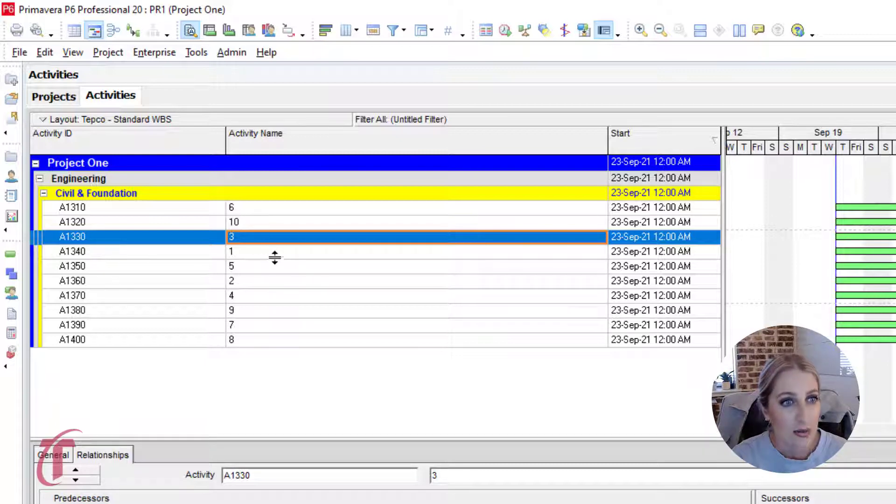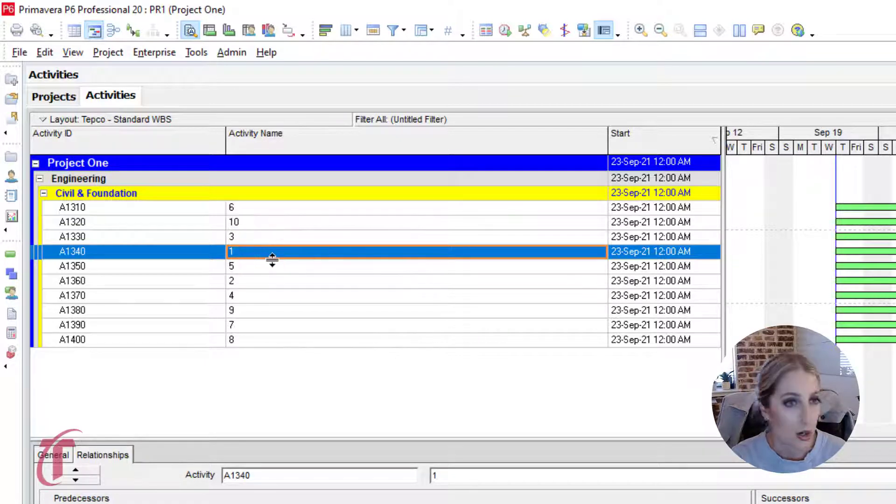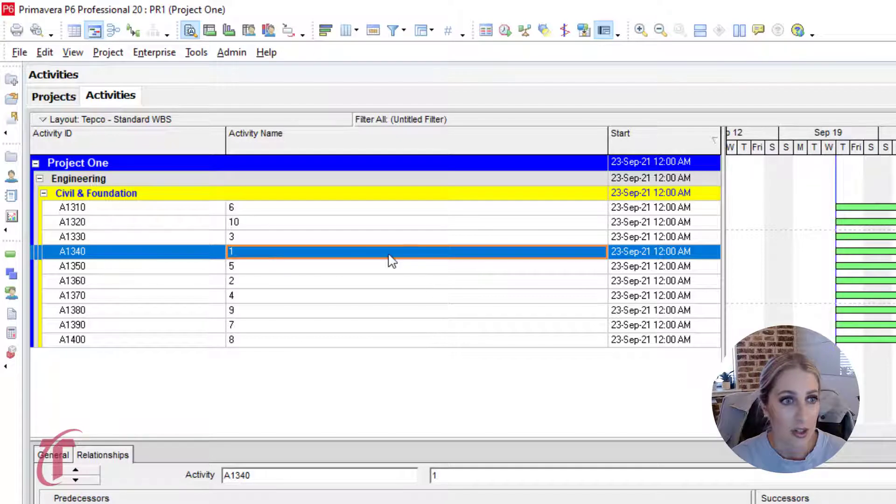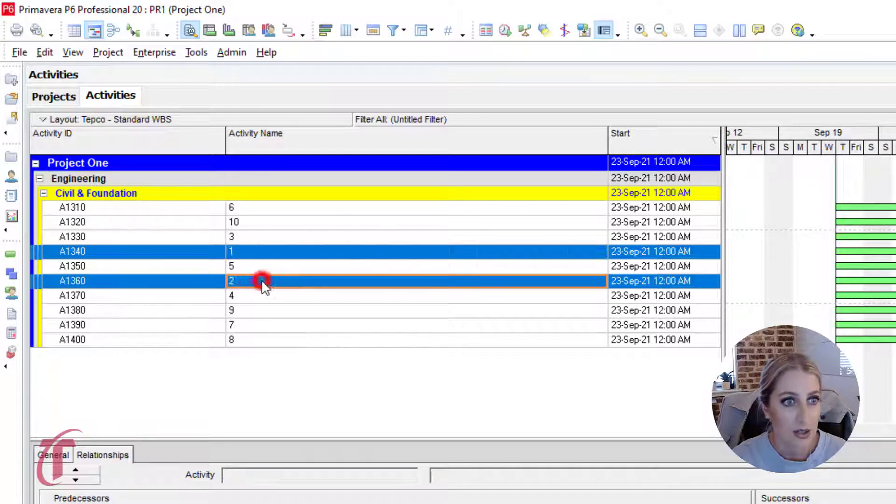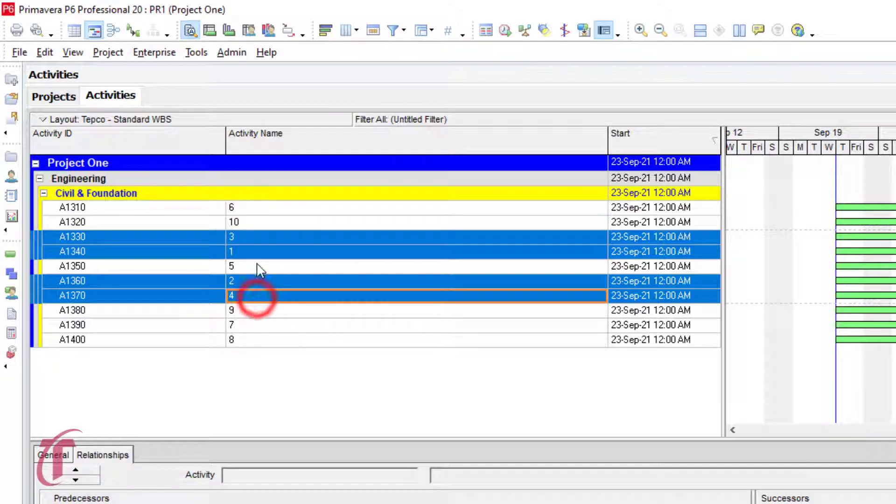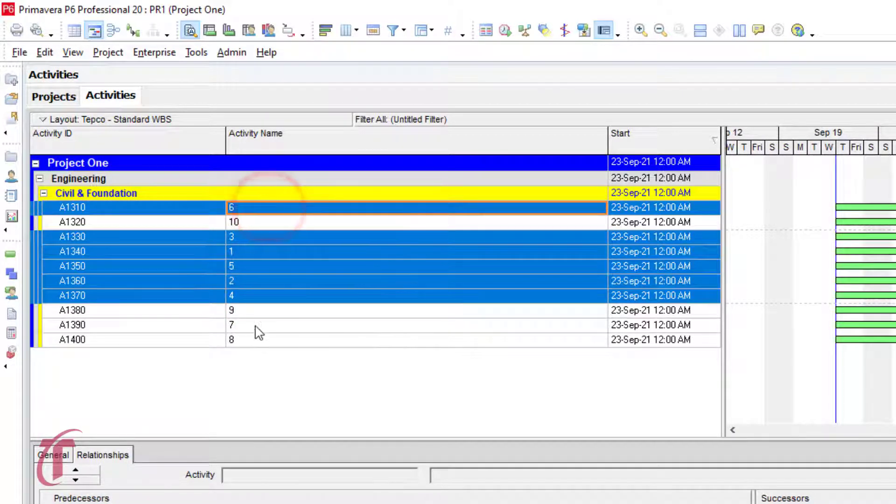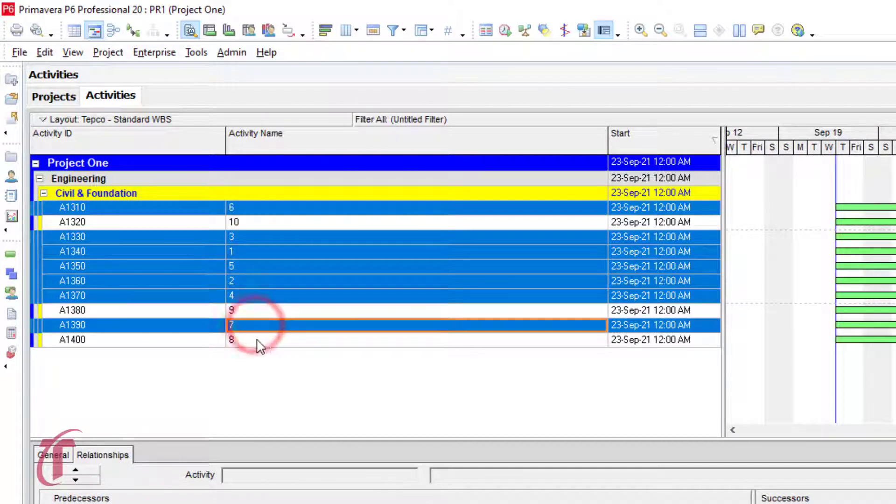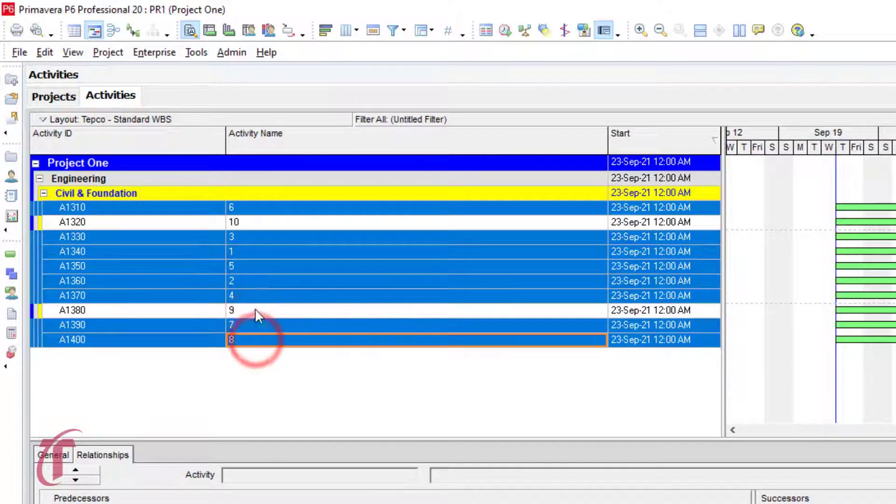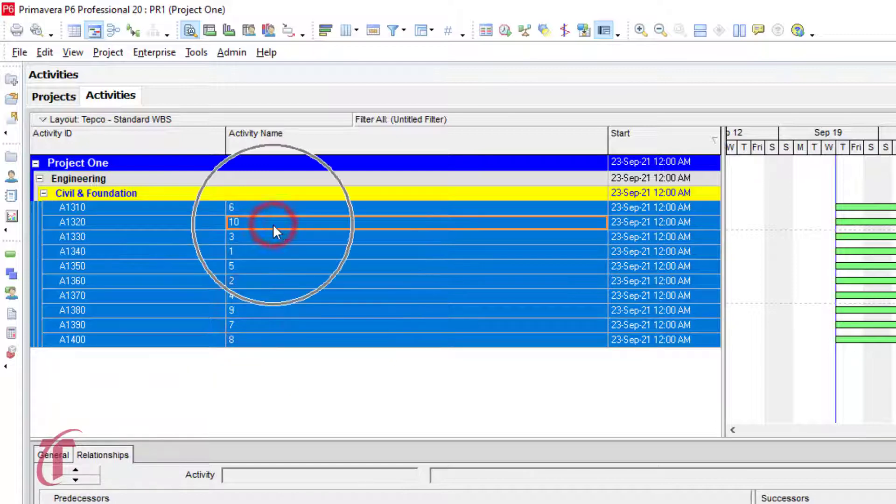So starting with the number one and then holding down the control button, I'm going to select two, three, four, five, six, seven, eight, nine, and then 10.